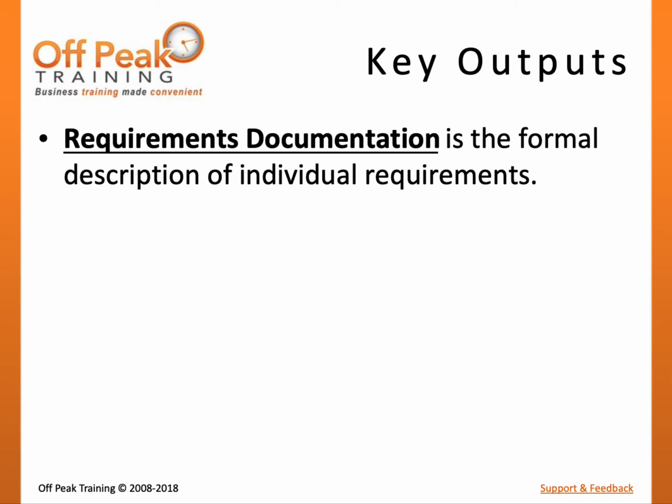For successful scope definition, requirements should be clear, measurable, testable, complete, and consistent. Components of requirements documentation may include business requirements, solution requirements, stakeholder requirements, project performance requirements, as well as any assumptions and constraints that may exist.